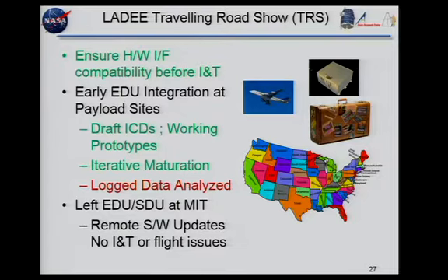And so we went back to the log data from the traveling roadshows, and he looked at it and he goes, "Oh, it was missing the command in the traveling roadshow like a year ago," and it hadn't noticed it because it hadn't risen to the level of... I'm not sure exactly why it wasn't noticed, but it was noticed at INT. So now it became my problem because it's a bug in the flight software. And you have your 1 or 2 days to fix it, or else it's going to start costing a lot of money. And it became a little stressful.